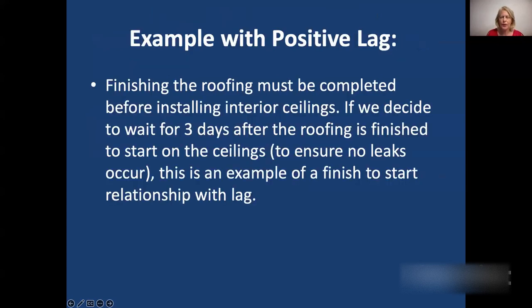A good example of this is where you are finishing off the roof and that the roof must be completed before the installation of the interior ceilings. If we decide to wait for a few days, 3 days, say, after the roofing is finished to start on the ceilings, an example of why you would do that is to ensure that no leaks occur. Then this would be an example of a finish to start relationship with lag, positive lag.